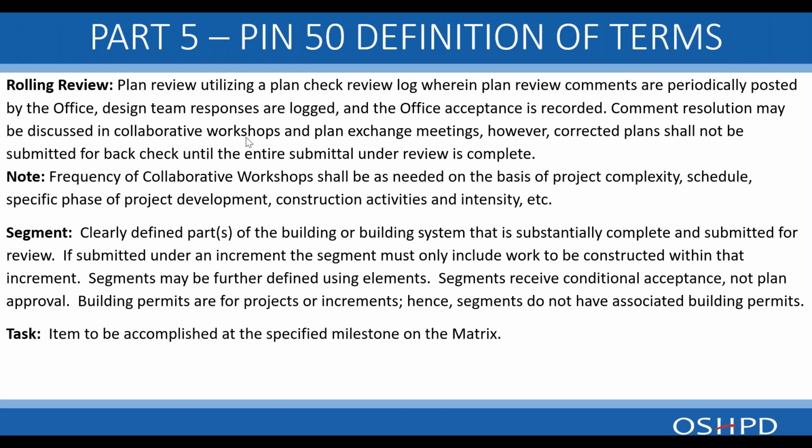So they are confident when they resubmit for back check, they've already discussed some of the responses to the comments. Note that frequency of collaborative workshops shall be as needed on the basis of the project complexity, schedule, specific phase of project development, construction activities, and intensity, etc.